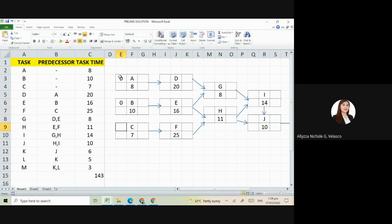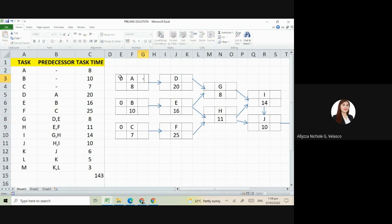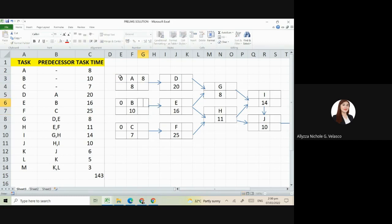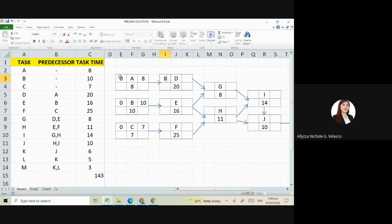These are all 0 since they have no predecessors. So we have here 0 plus 8. This is 10. This is 7. Next is letter D. What is its early start? Of course, that is A. Just copy from A. So 8 plus 20 is 28.